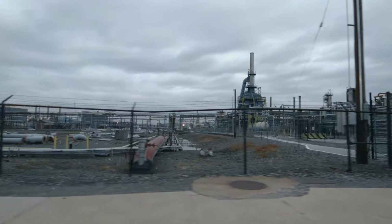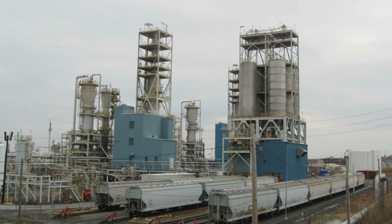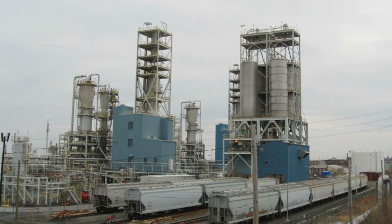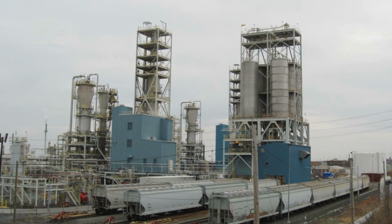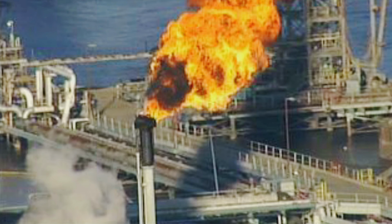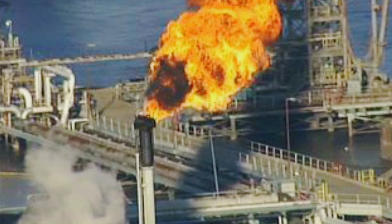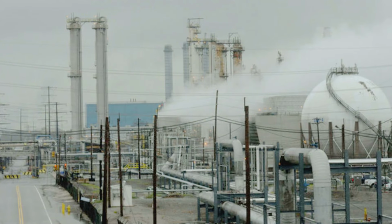We started the design and engineering portion in the beginning of 2014 and just started construction in November. The 12 cables are being installed on 50-foot steel poles, which are supported by a 4-foot diameter by 20-foot deep caisson. Each set of cable transitions the trays at each end as they enter into the substations for final connection tie-ins. At the transition point, the cables dead end on 12-foot wide by 12-foot long and 45-foot high steel tower structures. Not only are we responsible for the design of the towers, but we're also responsible for driving piles 50 feet deep, pouring concrete foundations on top, and then erecting the towers on site.